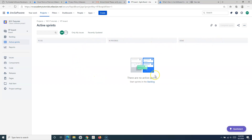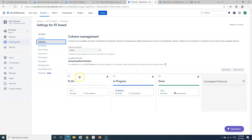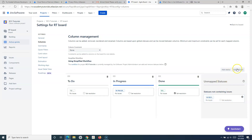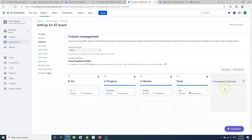In the classic project, to customize the board I have to go to the board settings using the three ellipses menu. Under columns in board settings, I can add columns and add statuses. For example, to create a new status 'In Review', I can use an existing status with that name, add the column 'In Review', and move it. The status gets automatically mapped to the column because the name matches.